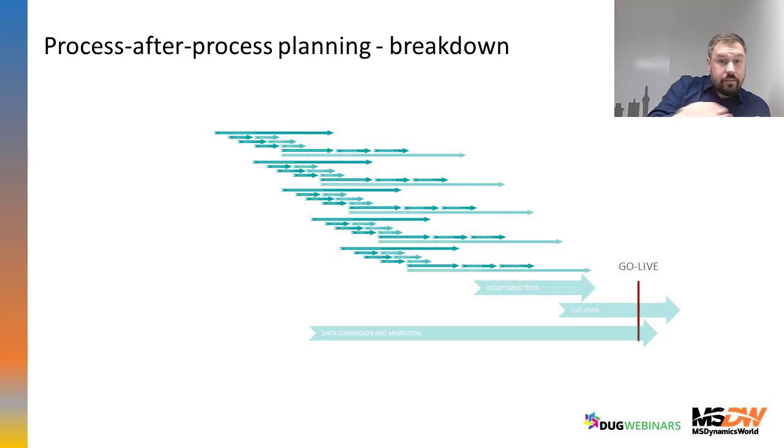But you can see how flat it can be and how much you can shorten the whole project, and that for the priority one there is almost no overlap of the capacities, because here is the developer for priority one, here work developers for priority one, here on the process number three for the priority one, and so on. And you can manage it to fulfill the scope of the project.